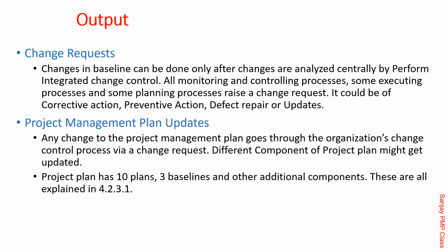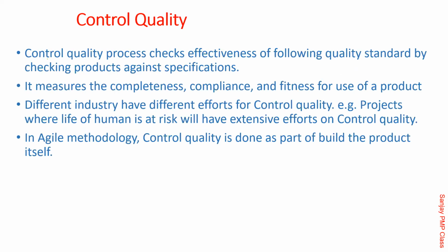Obviously, when you realize that some processes are bad, something needs to be changed, some new tool is to be introduced, some more training is to be given: change request. As you know, doing an improvement or changing anything in the existing plan starts with a change request. So, change request.